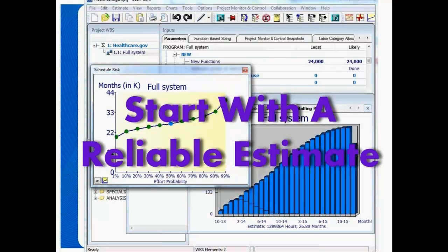A key issue, we believe, with the entire project was that reliable estimates were never presented up front. Of course, that's where Galorath comes in, and had reliable estimates been provided up front, some hard reality could have been thrown in the face of key stakeholders, and October 13th or various features of the system could have been sidelined to make the date.